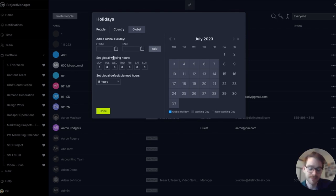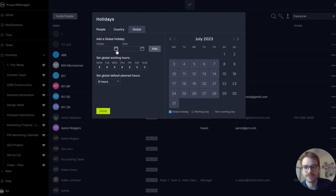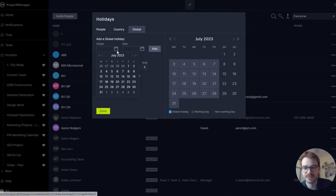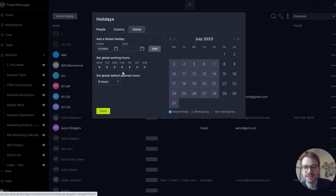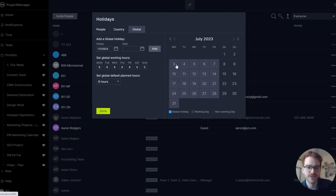If the company has a global holiday — let's say nobody should work on Labor Day — add a global holiday here. Use the simple calendar icon to pick a date, then click add and it'll be added to your calendar. You can see the calendar is color-coded: all the gray days are working days, and if there was a global holiday it would appear blue.